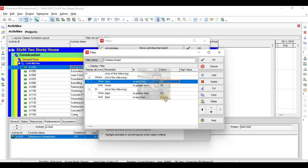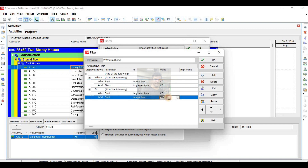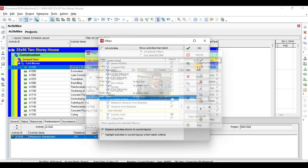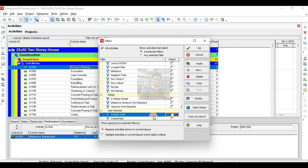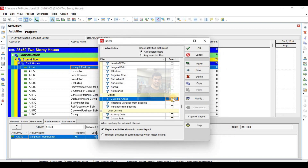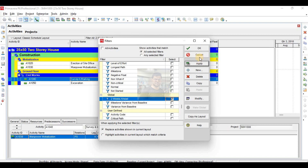So this is a two-week look-ahead schedule. If you want to make it a one-month look-ahead, you just change it to one month. If you want to make it three months, you just make it plus CD plus three months. Let's apply — first I will uncheck this filter and apply this look-ahead filter.